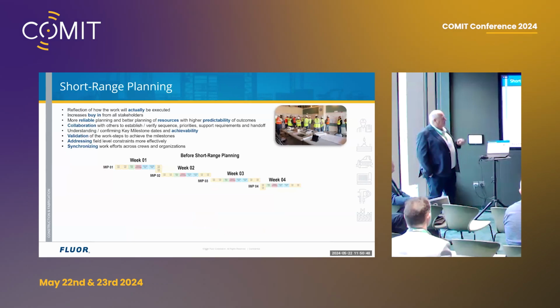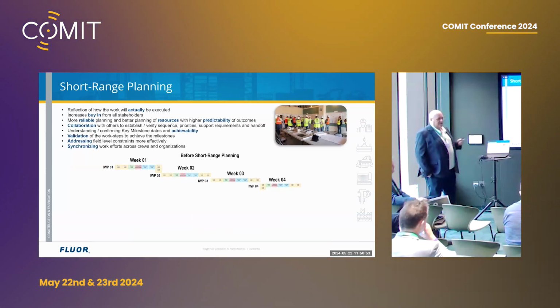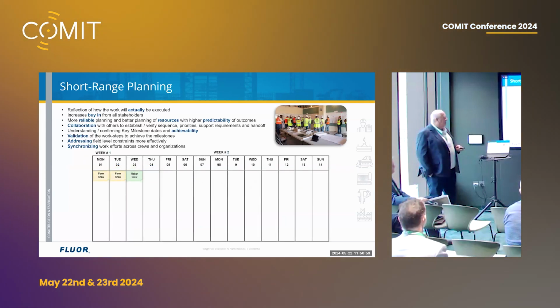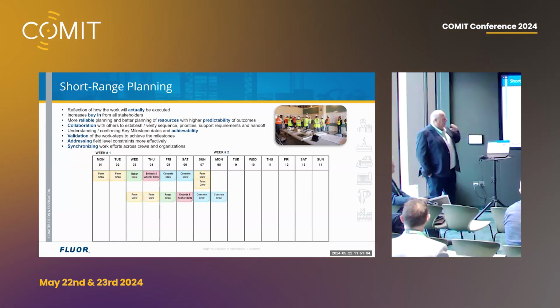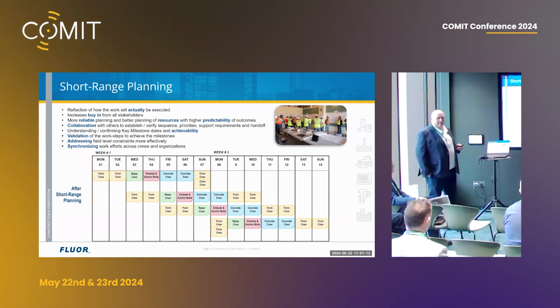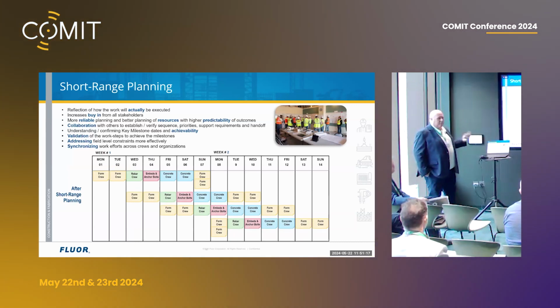Going into short-range planning, technically, it will work finish to start after each other. Traditional way, I will start that after the next one. But what we're saying is, can we optimise that? Can we make it a lot better? Actually, it did work, the animation. So we start thinking about who's doing what within the crews. So you've now gone from 4 weeks long to potentially 2 weeks. So you've now half that amount of work. Just being a bit more optimised, a bit more planning up front.